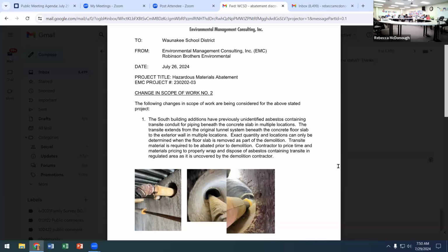Since this is something that came up during construction, we would request that it comes out of that 3.3 million. The request would be for this committee to approve change order 1 and 2 to allow the project to move forward. If it's approved by this committee, then the paperwork can proceed and construction can proceed as planned for the next couple of weeks. And we'll put it on the board as an FYI, probably under the agenda item that Jack recommended, where we get confirmation of these dollar amounts for this project. So we're looking for a motion.